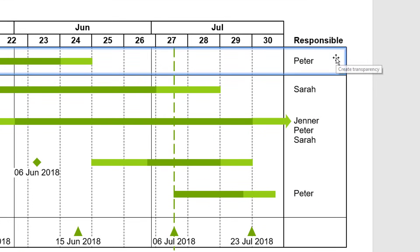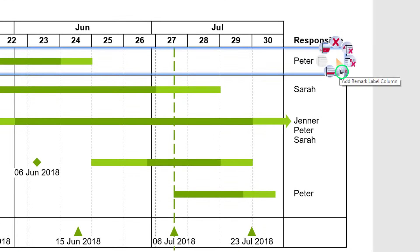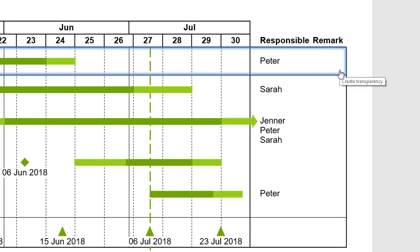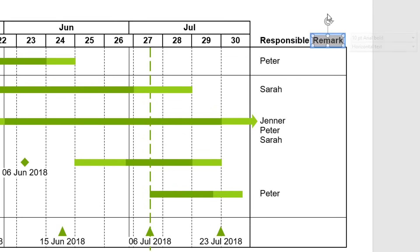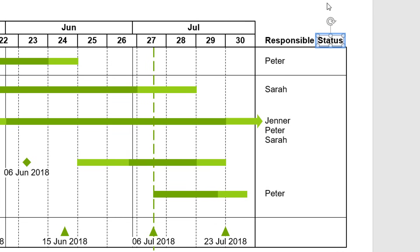Right-click into the new column and select Add Remark Label Column to add another column to the right where you can leave remarks. As with any labels in ThinkCell, you are of course free to change the heading label of the columns.